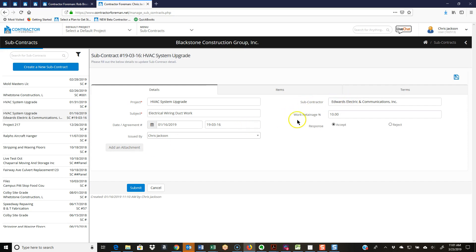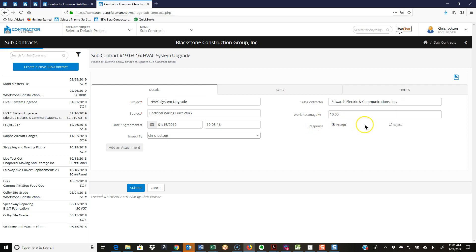The subcontractor - who is it? Are you going to hold retainage? So if you're holding retainage on them, commercial public works typically yes, residential probably no. We just type in the amount of the retainage. Contractor Foreman will track all that. Then we have a response - did they accept or reject?